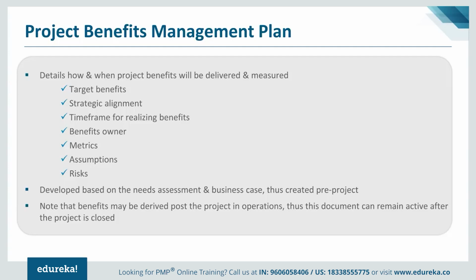One thing that we need to remember here is that even though you create the plan well in advance, the benefits will start coming once your product is introduced in the market, or once it is live and used by the users, etc. That means the real benefit management plan will be active even though the project is completed, because once the product is live or in the market, you will start measuring the benefits and comparing the performance against what's captured as a part of this plan.